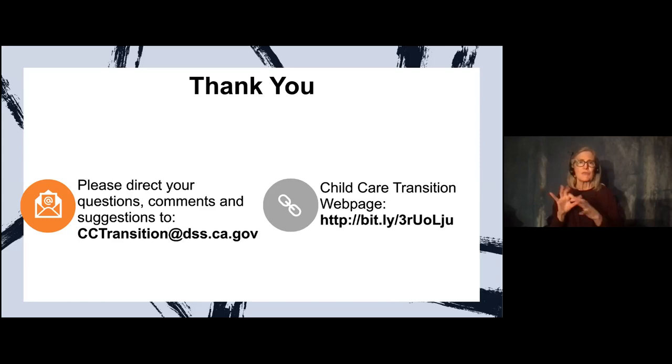contractors. So we are in the process of parsing through all of the different systems and applications for the CDE programs and identifying which ones can be lifted over easily between now and July 1, so that those will be moved in the first phase. And then the contingency would be that for those that really need more thoughtful planning and perhaps consideration of builds of additional or new systems, we would take a little bit more time to phase that out. And so more to come on that, but that is the current approach at a very high level in terms of contingency.